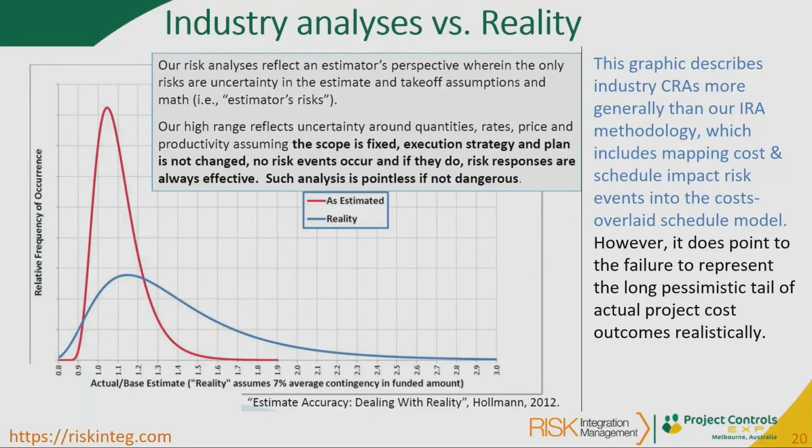And there's even a little bump around P90 where projects have gone completely feral and go into a chaotic state. And Holman's done some analysis about that, and he looked at chaos theory and complexity theory, decided the maths was terrible and came up with a traffic light system, which would appeal to engineers really. And so based on certain metrics, he forecasts how likely it is that any given project will fall into a chaotic state. And I've been on several of those where hundreds of thousands of man-hours extra have been consumed.